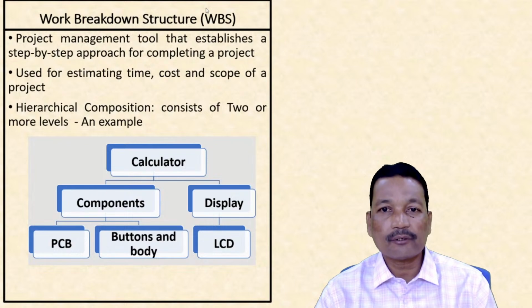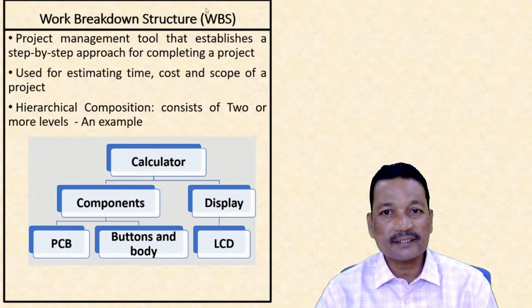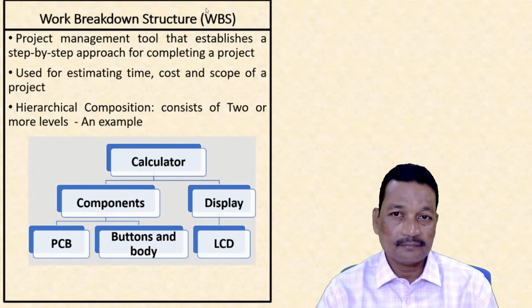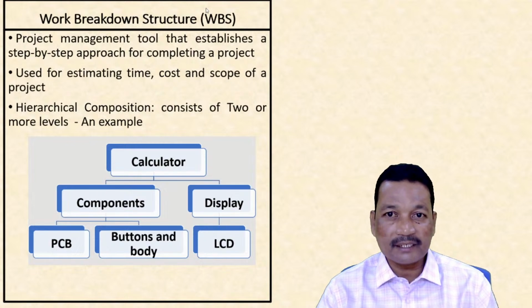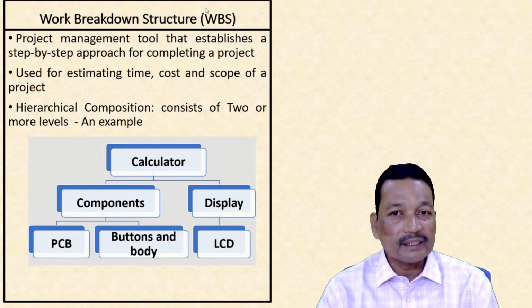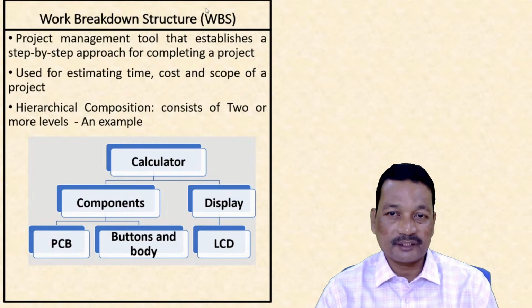What will I do? I will order from the 3 vendors. Board is coming in 5 days. The frame is going to come in 10 days. So the maximum time taken is by the frame. Within that time, the carpenter as well as the vendor supplying the screws will be delivering us their items.